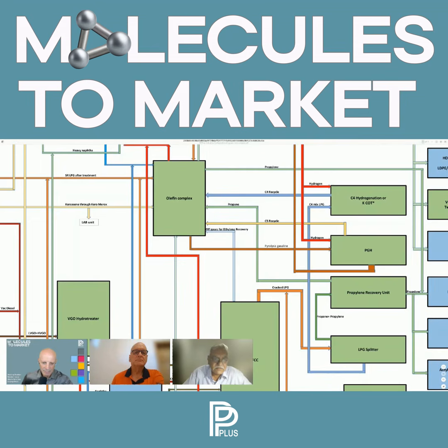Now, since each unit is costed elementally this way, our cost estimates are very accurate, because if I have done the plant and machinery cost to a reasonable level of accuracy, the bulk materials can be factored with a certain cost. So we know how to reach the bottom line. Each unit can come as a bottom line cost from there. So this is one part. This is how we will arrive at all the costs. So the cost part for all the units can be assembled that way.